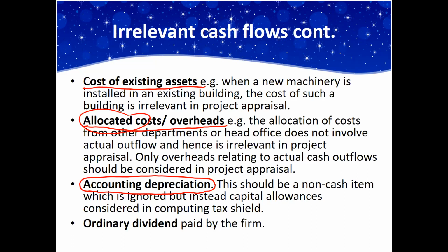However, when it comes to the value, you're touching on the loss of value. In itself, it is not relevant. There is no actual cash movement because of the depreciation charge on that particular asset. And I think I already mentioned the case of the dividend. It is taken care of by the discounting rate.